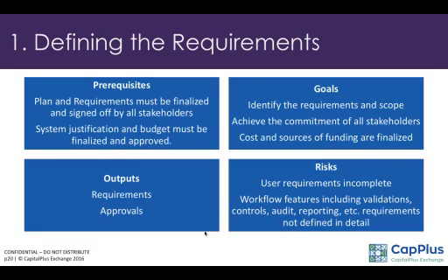These steps should have resulted in the project charter, the project initiation document, and the various documents we saw in the prior slides covering the planning phase, including the justification and the budget. Note that these must be approved. The risk at this stage is incomplete user requirements. I think we have stressed a lot on this, which may result in products and services not being offered as desired or designed.